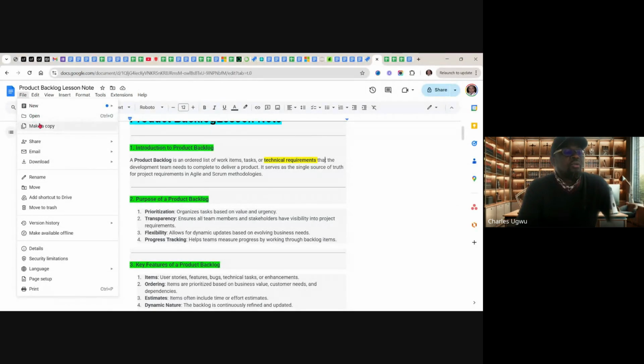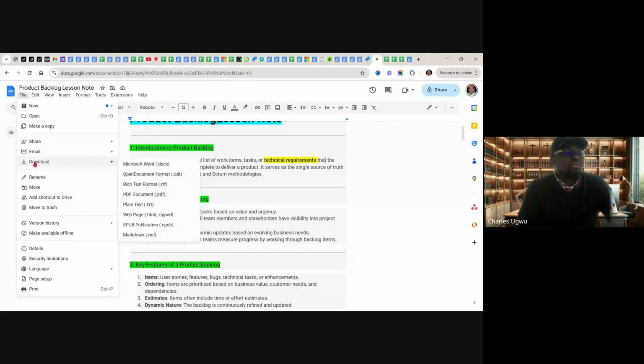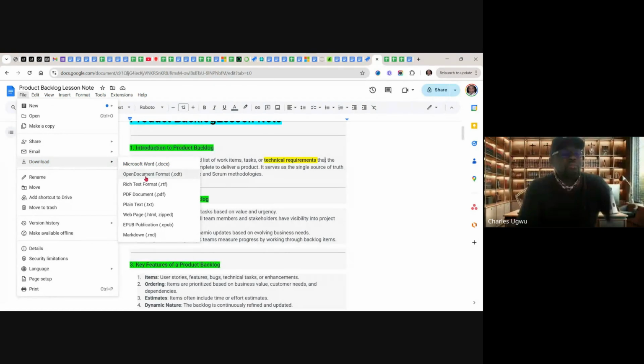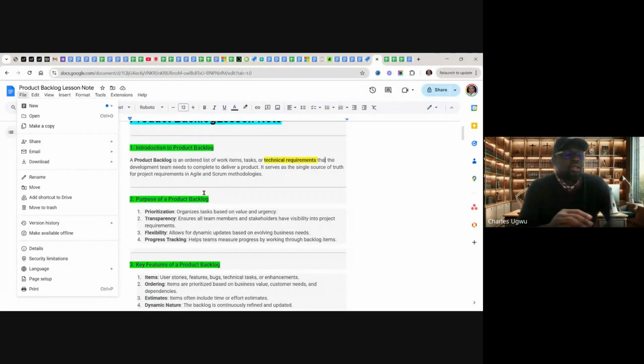Some of these features become so big we break them down into smaller ones. You see here, this feature Download is now a feature under this File epic. And you see so many other smaller pieces of software. All these things are tiny, and then they can be called user stories. So it's just breaking them down.